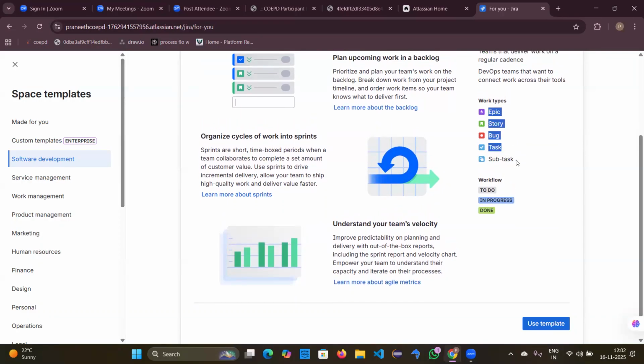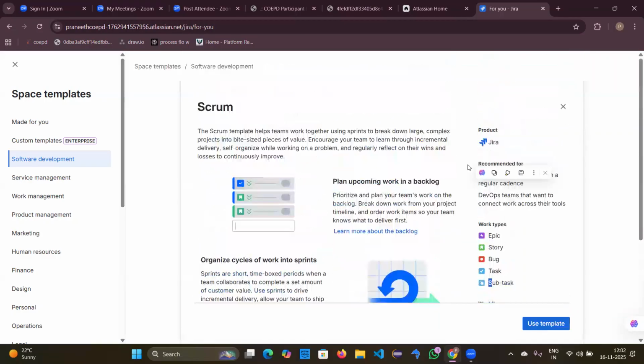Under a particular user story, if you have various tasks, then you can create tasks also. For example, under login, there will be tasks like the username should be entered, password should be entered, right? For a login process itself, we have tasks. Those will be coming under this task. And a subtask is when you have further divided those tasks, then you can name that as a subtask. Okay, so this is all about this Scrum.